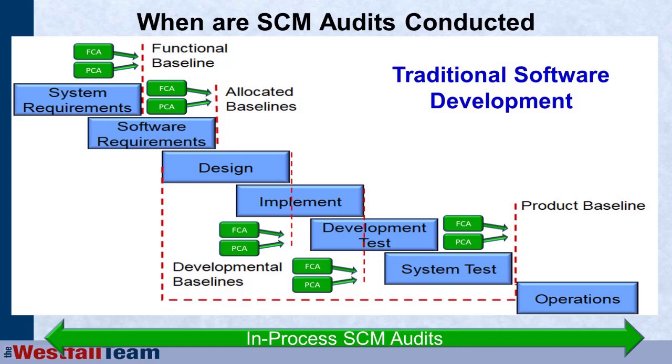So we can do this throughout the development lifecycle. Now, these do not have to be huge, big, multi-day audits. I've done configuration audits, for example, when we check to make sure the code met coding standard. This is an hour or two where I would go sample 20 pieces of code out of the configuration management library and check to make sure that they had met coding standards. So again, these are not laborious necessarily, but they can be done and should be done as appropriate.